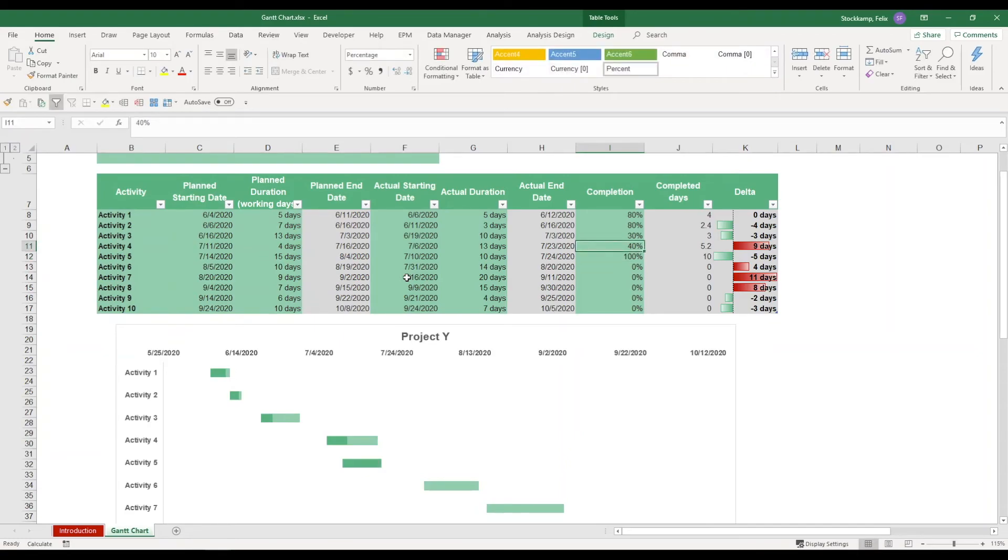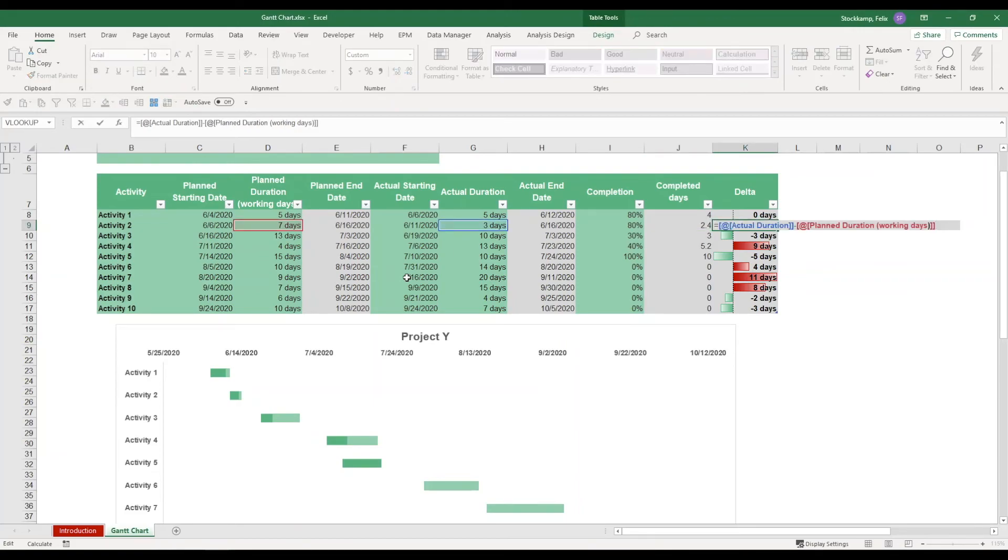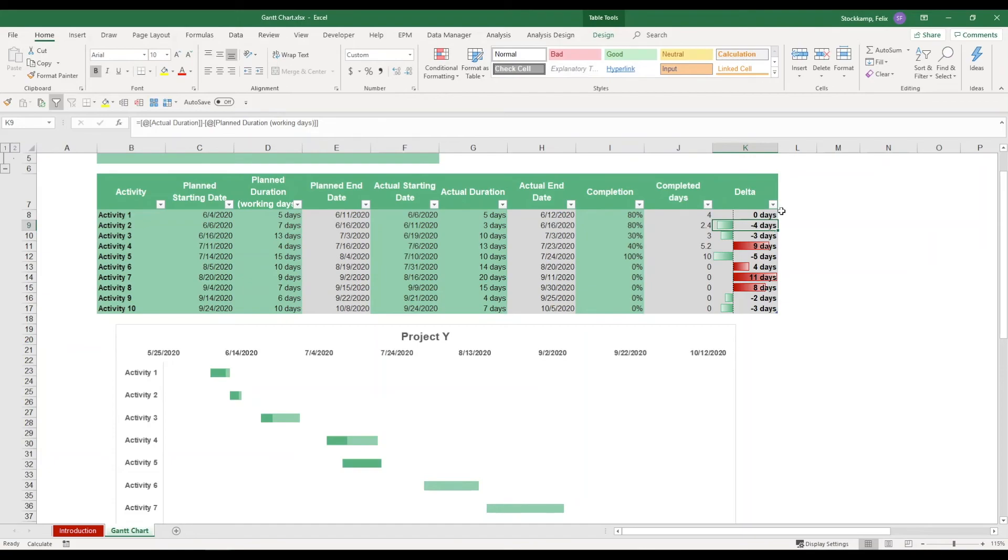Now overall you may want to track how you're performing in terms of saved or wasted days. And what I mean by that is sometimes the actual duration is lower than the planned duration, and this we're tracking in the delta column. In this particular case it's saying minus four days, so that means that we've actually completed the activity four days ahead of plan.